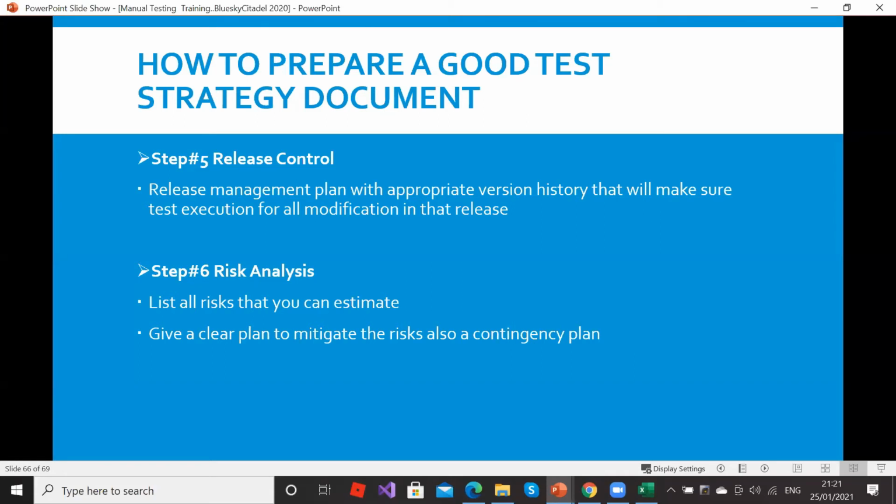Contingency is just, okay, I know I can finish this thing in 10 days. Yeah, 10 days is fine. But also give yourself give or take in that 10 days. We've wasted time on even getting the environment, and also this bug has been going back and forth. So there's wasted time, you are blocked there. So that's why we say contingency. You could put another 5 days.